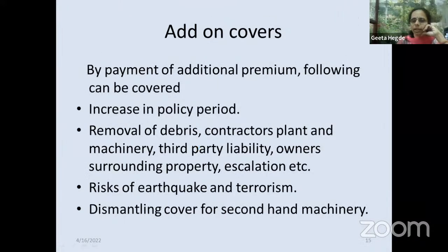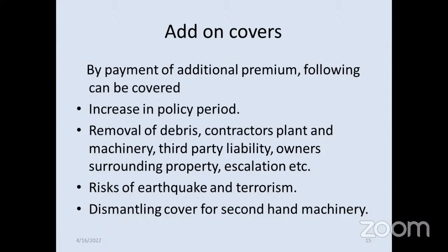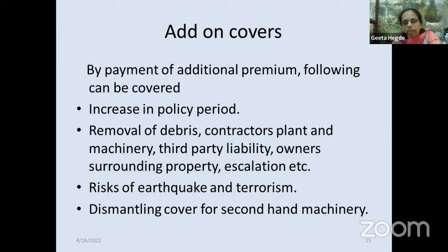Add-on covers under erection policy. Increase in the policy period, that is if the policy period opted is like suppose 12 months and later work is not completed, then it can be increased. Removal of debris, contractors, plant and machinery, third party liability, surrounding property, escalation, these provisions are there. Earthquake, terrorism. Dismantling cover for second hand machinery. Sometimes erected machinery needs to be dismantled and again re-erected. So in such cases, the dismantling cover can be given and some premium charged for that, which is going to be 60% of the original rate.